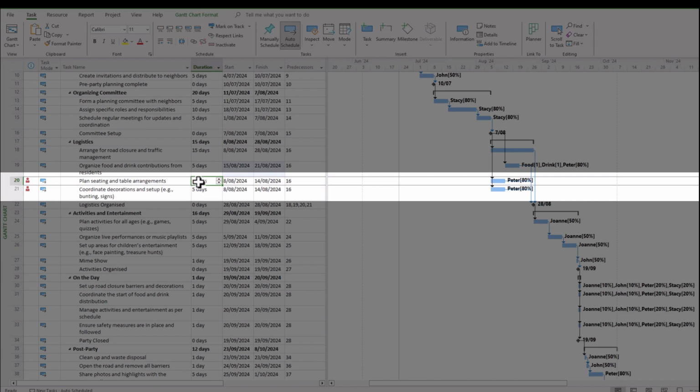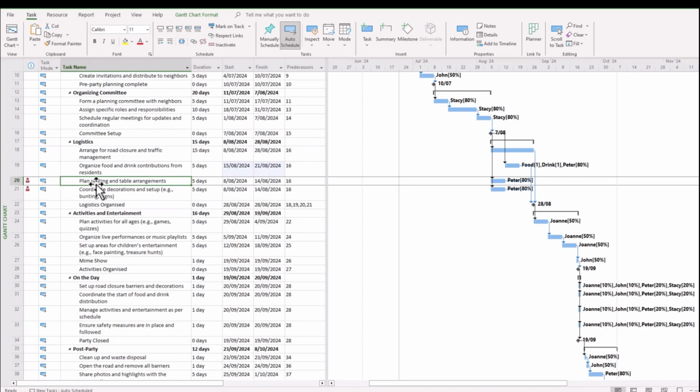But when you stack tasks in parallel, well, that 80% in this case is really the same as saying 160%, which is certainly over allocated. So once again, this is why we can see our little red men here on the column like so. So what to do? Well, there is a useful little function.